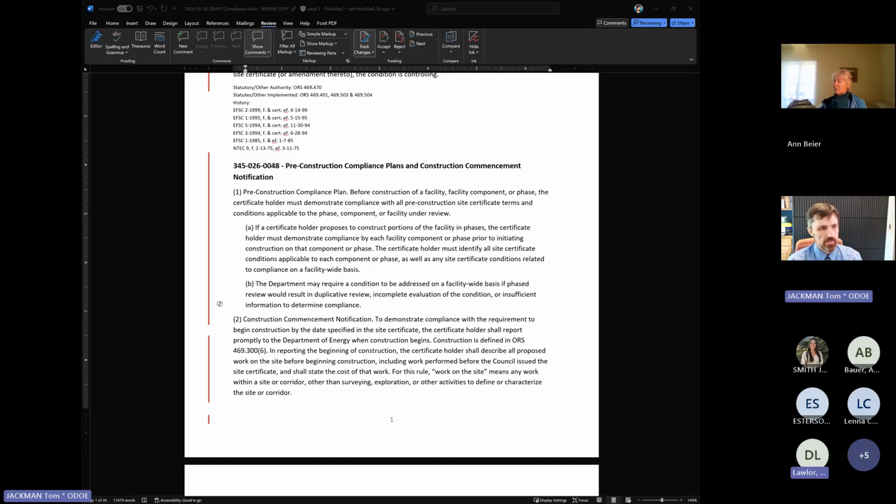Yeah. Okay. It's just very important because there are things like, for example, particularly your electrical permits that you don't need. As a matter of fact, you can't even really apply for them until later, because then they come out and inspect and all that kind of stuff.